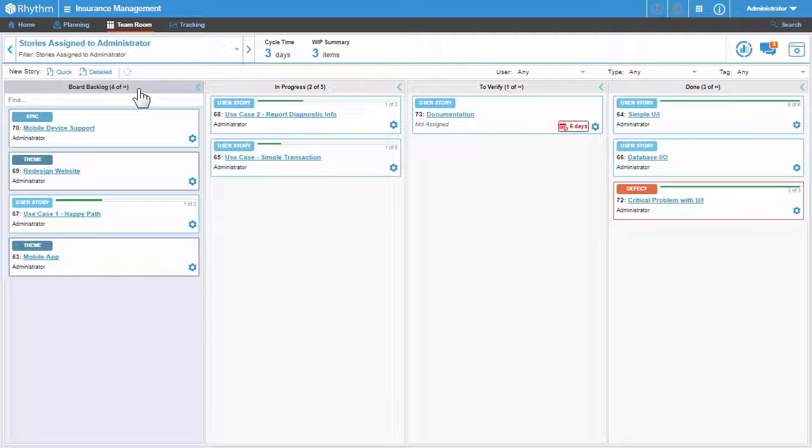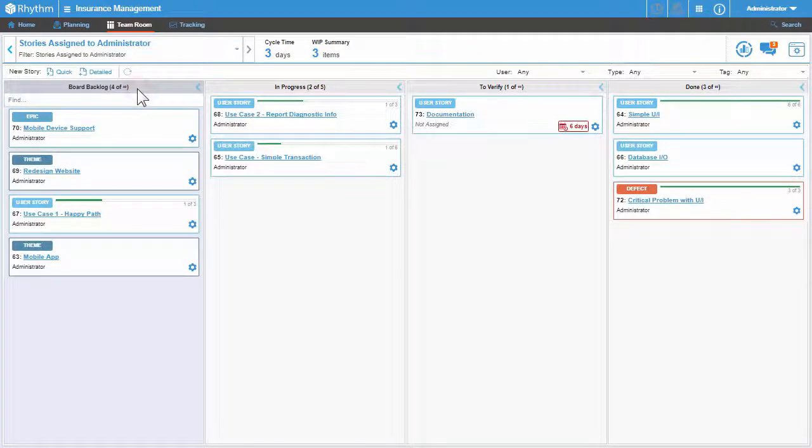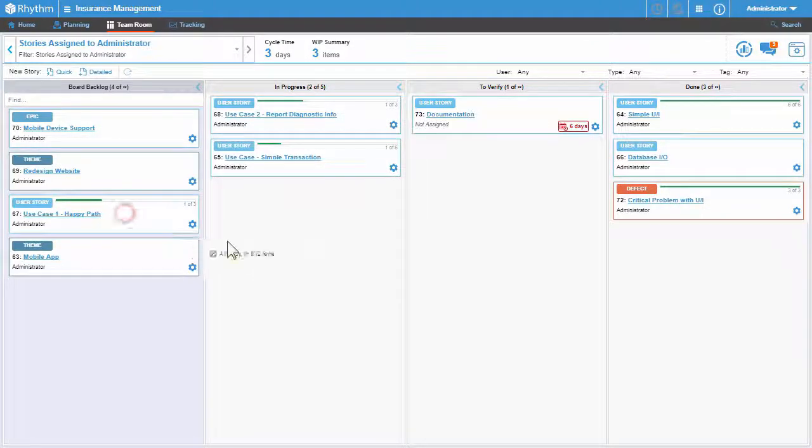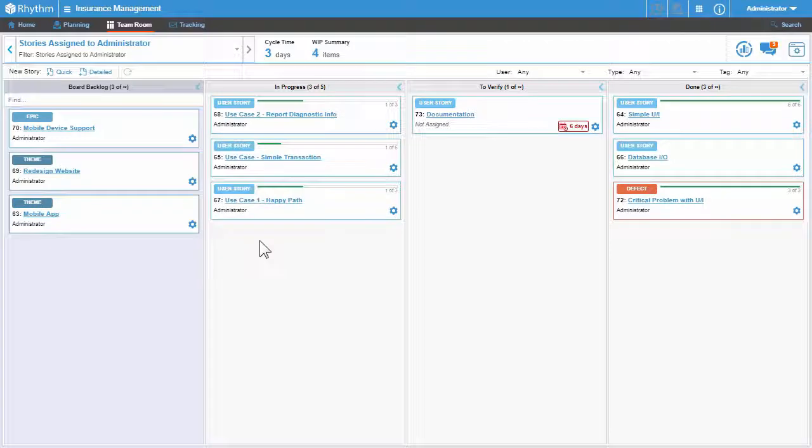As you know, the first lane of the Kanban board is the backlog source lane. When you are ready to start working on a user story, just drag and drop the story from the backlog into the in progress lane.